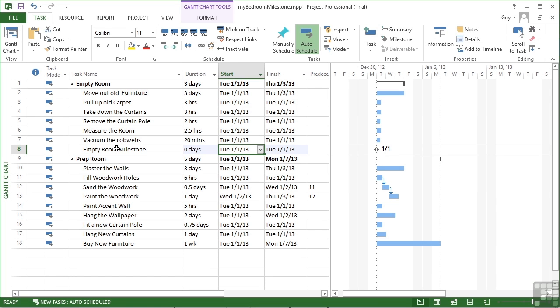You can see it defaults to days anyway, but it's zero days. Over in the Gantt chart, I get my little diamond, which is my milestone, with the date of the milestone — which is January 1st.